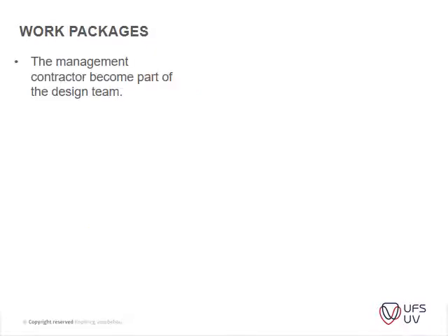Okay, so let's look at our work packages. Work packages is where the management contractor becomes part of the design team. So you've got your managing contractor. It's usually on big technical builds. You get the contractor in together with the design team if the design team doesn't necessarily have all the expertise to do the entire design.